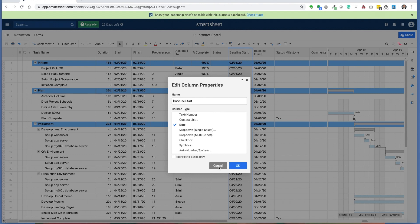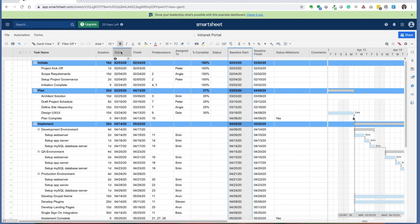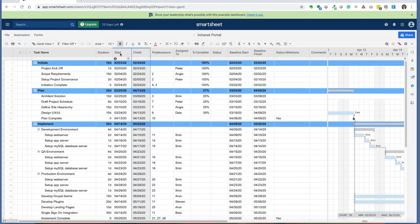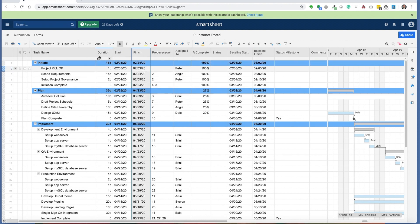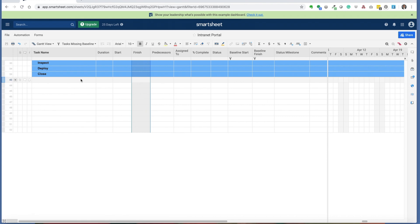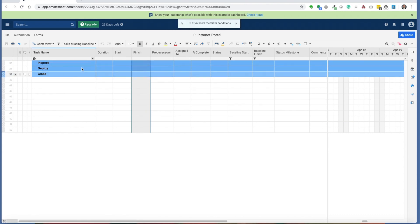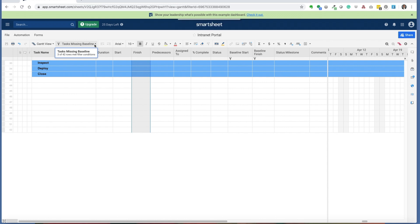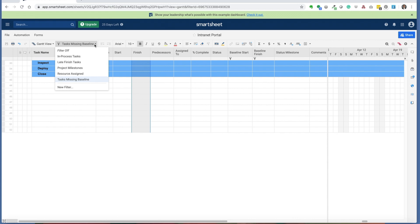When my project was ready to be baselined, I simply copied all the start and finish dates from the start and finish columns and pasted them over into the baseline start and finish columns. One of the quality checks I run is to make sure any of the tasks that are missing a baseline have been correctly identified. In this case, these are just the higher level phases, so I'm not as concerned about those tasks having a baseline start and finish date. What I want to look at are the individual work or task packages to make sure that those tasks have a valid baseline.